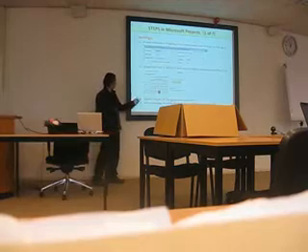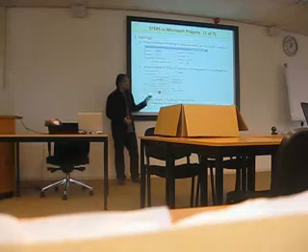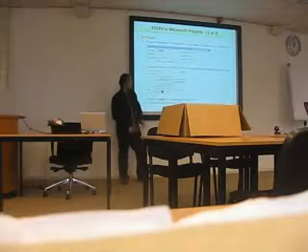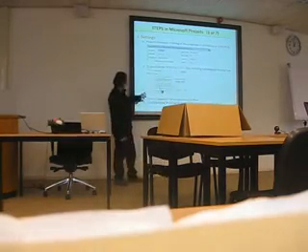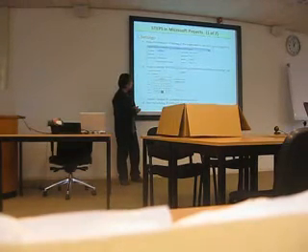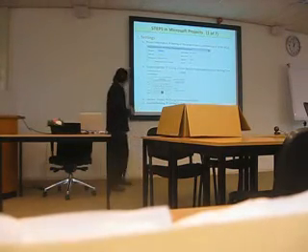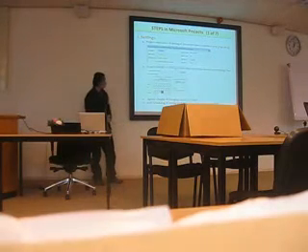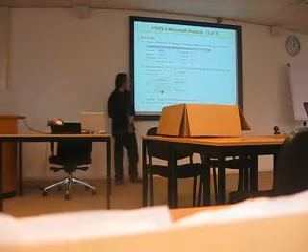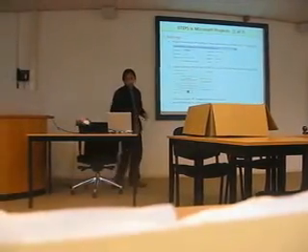And then the third option is changing the currency to euro. Otherwise, it will follow your operating system's settings. If the operating system setting is in dollar, it will be dollar. That's why it's very important as well. You set the currency for our budgeting later in euro, not in dollar, in rupiah, and so on. And then the fourth one is we set the auto scheduling. It's very important because we want Microsoft Project to do the scheduling automatically later. This is a very important setting before we do other steps.